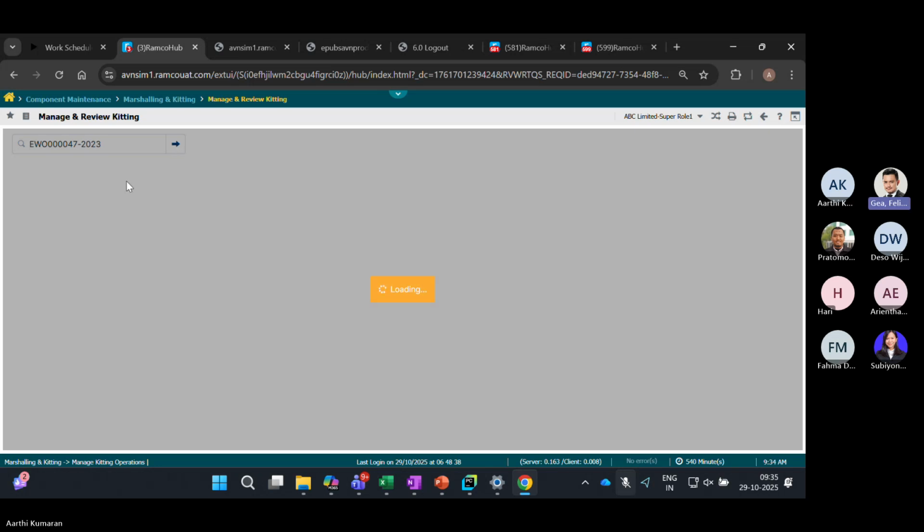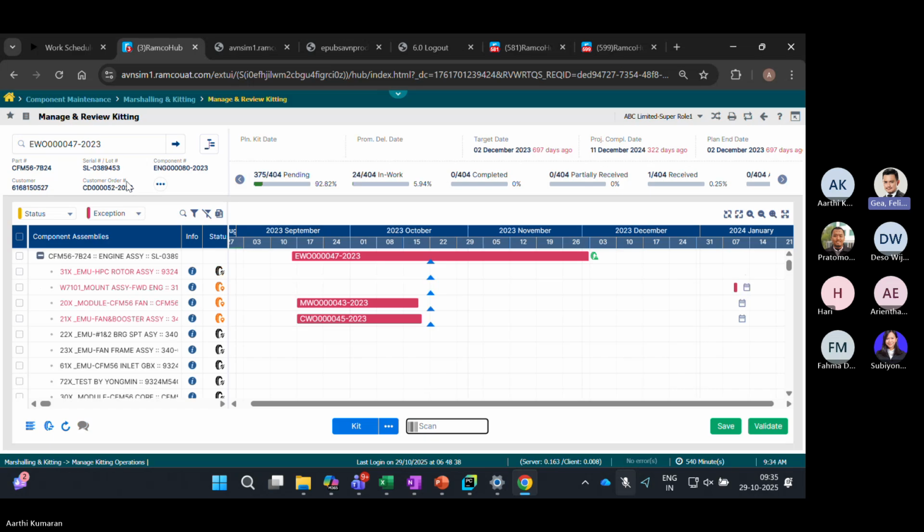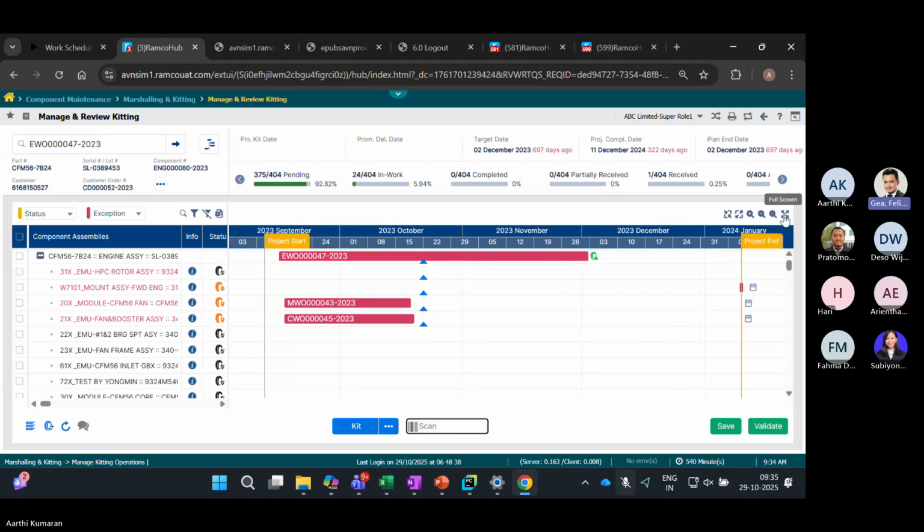And coming back to your point, how do you qualify this? This also has been ranked based on your assembly schedule. So you need to focus only on the assembly schedule which is getting started now. Say 48 hours before that, let's assume the part should be there.